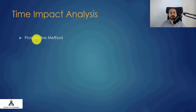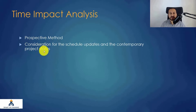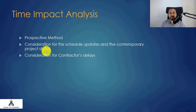The Time Impact Analysis method is also a prospective method — as with the baseline, I am forecasting the impact; the impact has not happened yet but I am forecasting how it will look. In this case, there is consideration for schedule updates and contemporary project status.